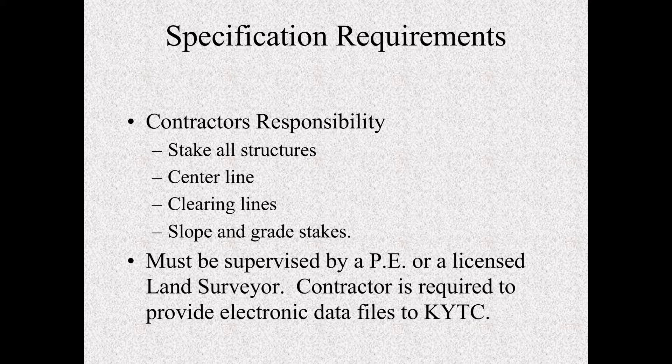If you have a contractor refusing to give you grade stakes, notify your engineer immediately. We cannot adequately inspect a job without stakes. Even if a contractor has GPS and they say they're doing everything with GPS, that's great — they're allowed to do that. But we may not have a GPS unit and we can't be checking if we don't have stakes. So if you have a contractor refusing to give you stakes, notify your engineer immediately and we will get that resolved.